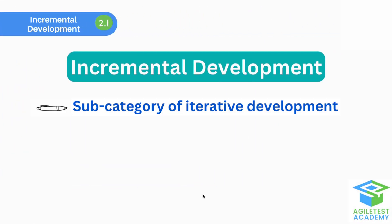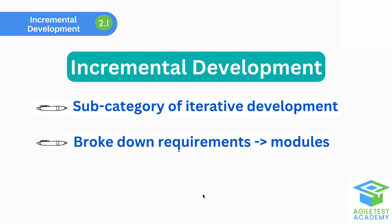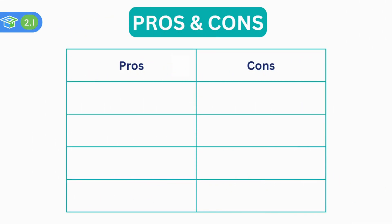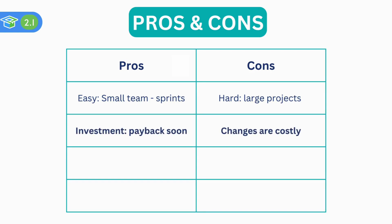A subcategory of iterative refinement is called Incremental Development. It is a type of iterative development, but not all iterative development is incremental. Incremental development is a process where requirements are broken down into multiple standalone modules of the development cycle. Each module goes through analysis, design, implementation, testing, and maintenance phases, and each successive version of the product is usable and adds user-visible functionality to the previous version. It is easier for small teams to develop small sprints correctly than to collaborate on large projects with many ramifications. Although the project investment will pay back very soon, any change to the requirement may be costly to the company.